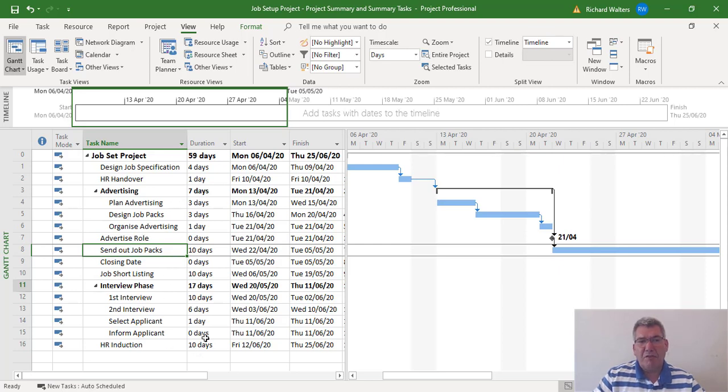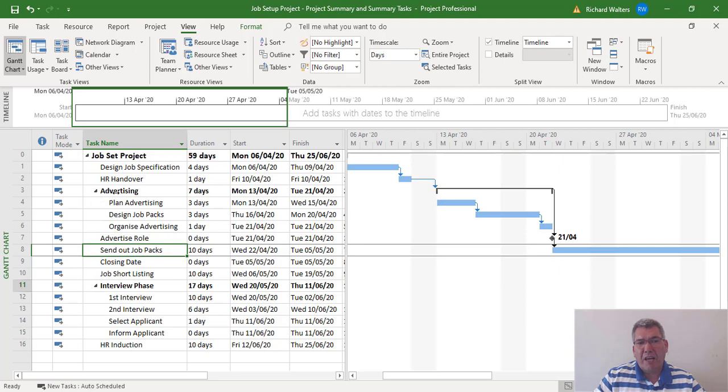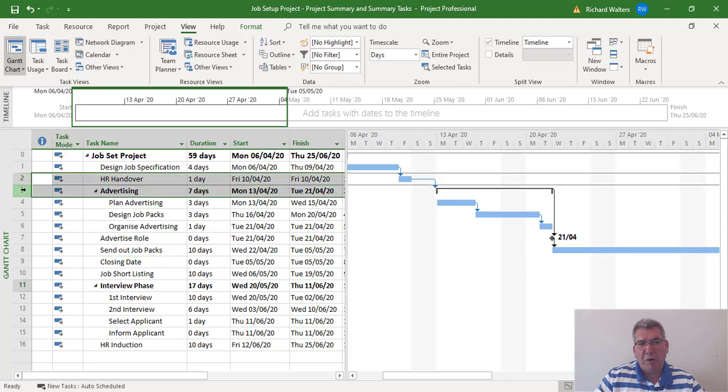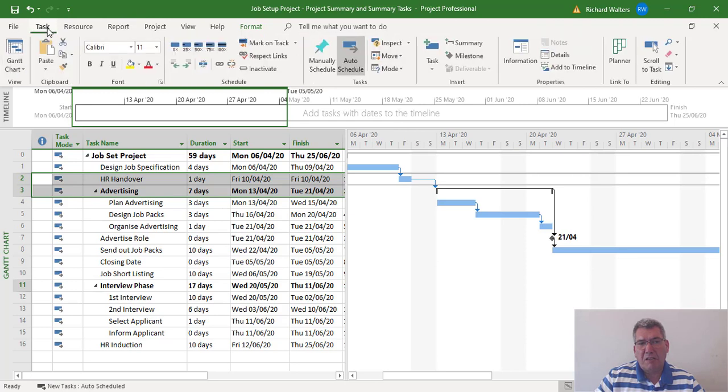This takes a little bit of doing and understanding. When you're modifying summary tasks, I'm very careful with this. Personally, I would unlink any task that's connected to the summary task. So I know that two HR handover is connected to the summary task, so I would break this away. I call this isolating, so I would isolate the summary task by itself.